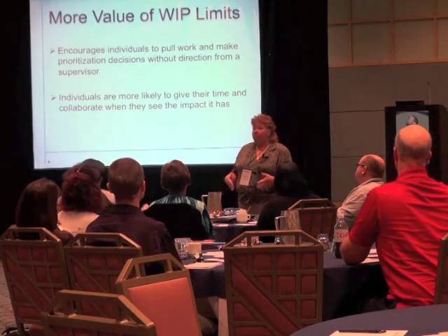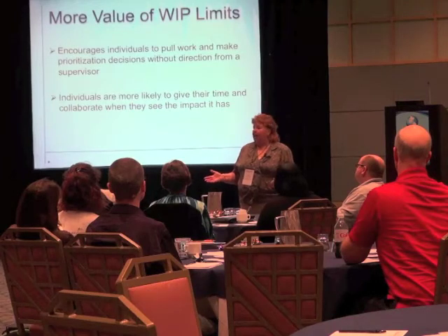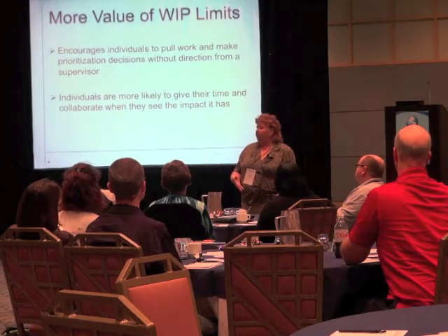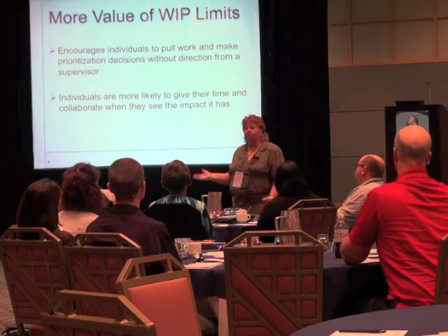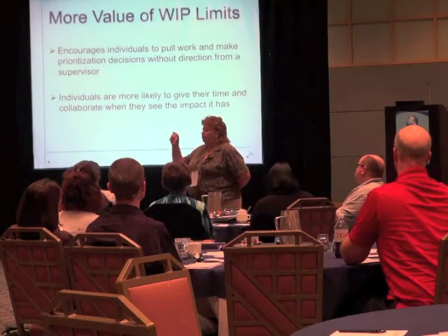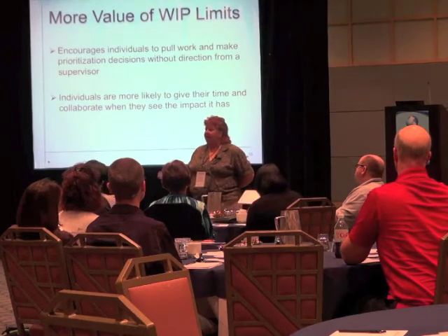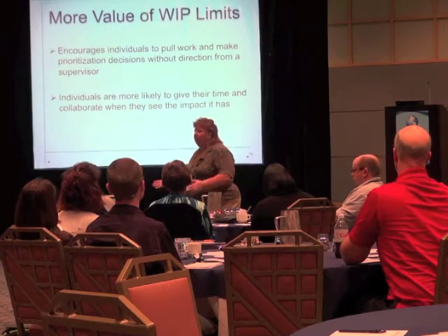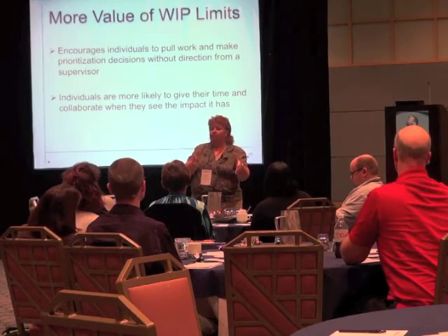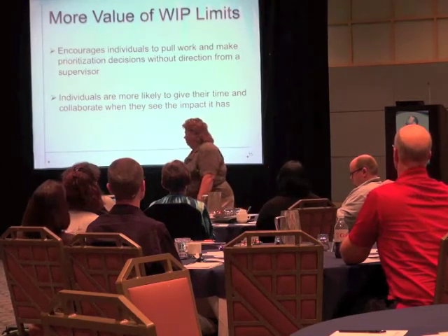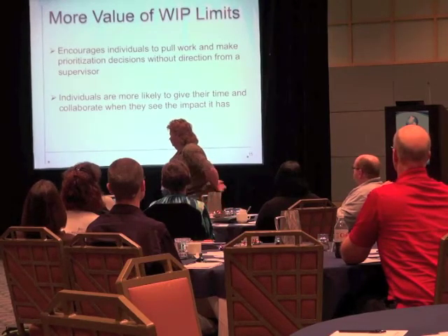But the fact of the matter is, much of the work that gets done on a project team, anybody who has a little bit of subject area knowledge could probably work on some portion of it. And seeing those buffer queues back up is a signal to the team that we need to move our work to where things are getting backed up. So it does really encourage teamwork.